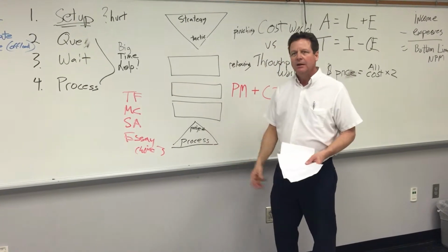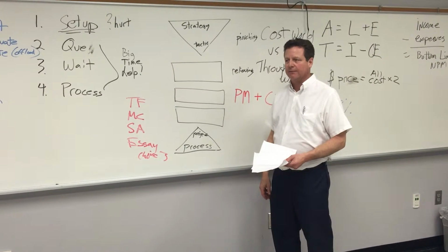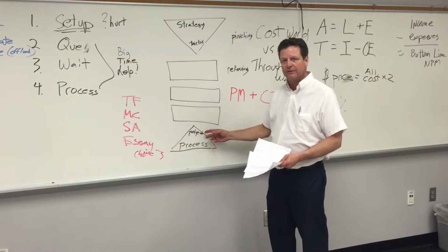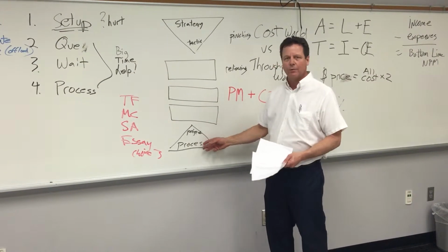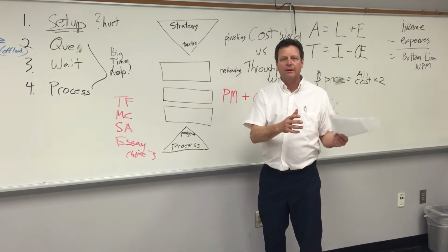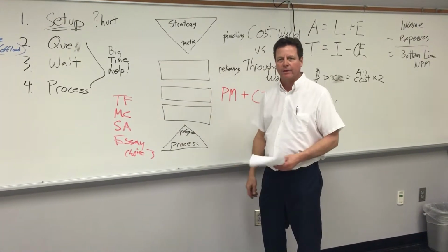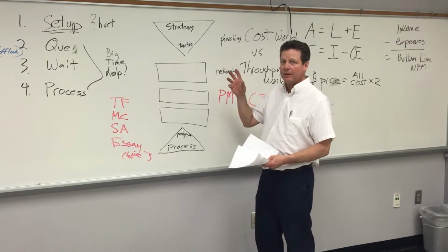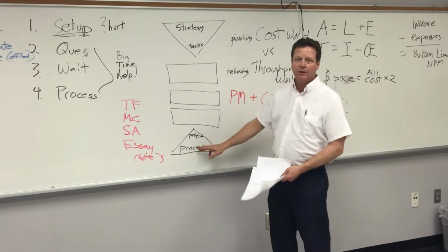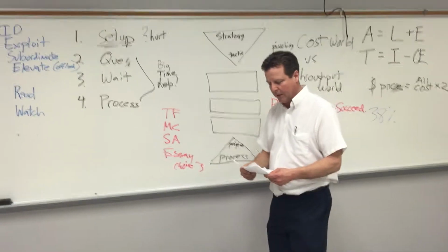Project and process, well, we said that a project has a life. It has a beginning, a middle, and an end. It has 5 life cycles. You're going to need to know that on the test. You're going to be able to contrast that with process. A process does not live in any one period of time where it has a beginning, middle, and an end. It just kind of goes on and on. Your own life has a beginning and a middle and an end, and it is a project. But life in general, life goes on after you're gone. So those were the differences between them.